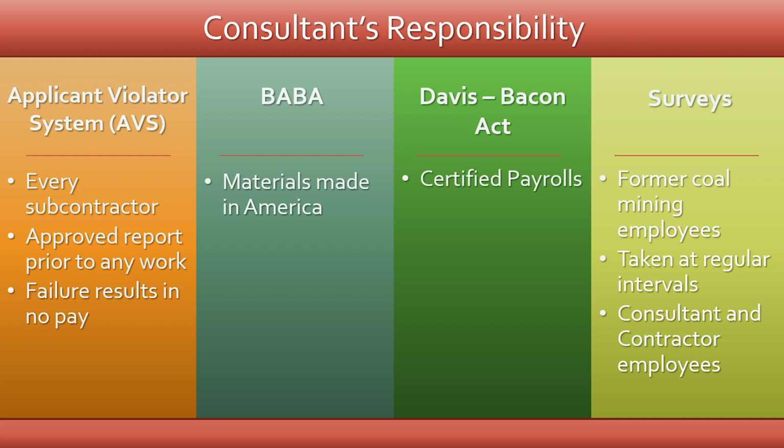The consultant must also ensure that the contractor complies with all applicable laws, including the Davis-Bacon Act, Build America, Buy America, and any other legal requirements. The Davis-Bacon Act requires certified payroll. Build America, Buy America requires documentation showing that certain materials are produced in America. Surveys will need to be performed at regular intervals to determine how many employees for both the consultant and the contractor are former employees of the mining industry as part of funding requirements.